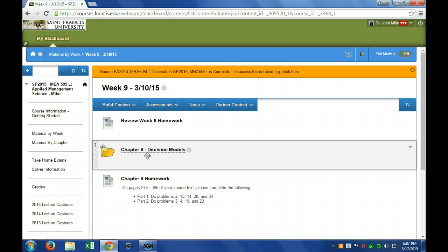So I'm going to tell my boss there's a 50% chance I'll be done in 100 days, 50% chance it's going to take longer than 100 days. And if my boss says, well, what are the odds you're done by maybe 120 days, I can say there's a 90% chance I'll be done within maybe 120 days, given the way it is right now. Okay, so that's what we're trying to do here.